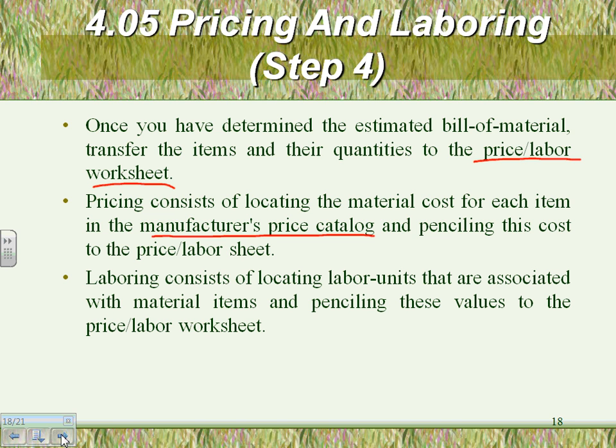Labor units, you can get your labor units. There's a lot of people, Nika has their own labor units, so you can buy these labor units and import them. As you will see with this next project, you can pick different labor units, Nika 1, Nika 2, Nika 3, based on how hard the work is. If the work is too hard, Nika 3.